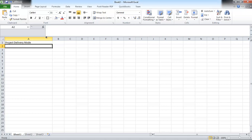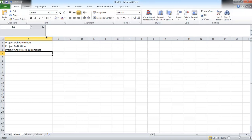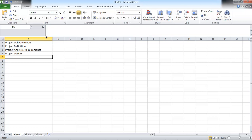And there are key phases of the project. So this delivery mode is pretty high level. So we have a project definition, right, and that would be our first stage. And then we have project analysis and requirements, and then we have project design. This is where we can do the actual design of our product. And this is pretty generic. So if project definition phase, this is where we define the goals, we define the objectives, we define the costs, we define the business benefits of what we're going to be trying to do.